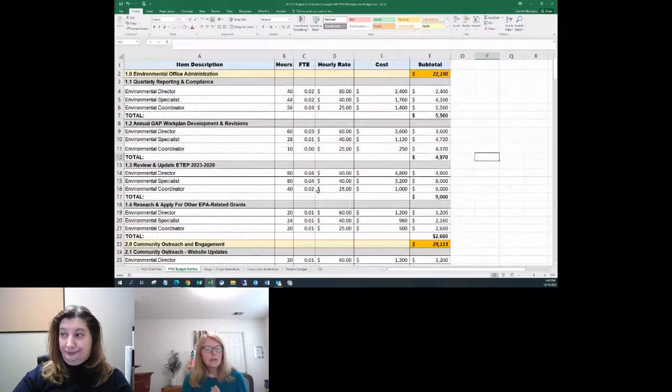Yeah. If you've got a salary increase approved for all your staff by the council, that's going to eat up part of your budget or your indirect changes, things like that. So you're going to need to come back to us and say, I don't have enough money now to do all the work I'd planned to do just because of salary increases or indirect increases. So it really helps you think through and rebudget things and have a justification on why you can't finish the work or things like that.